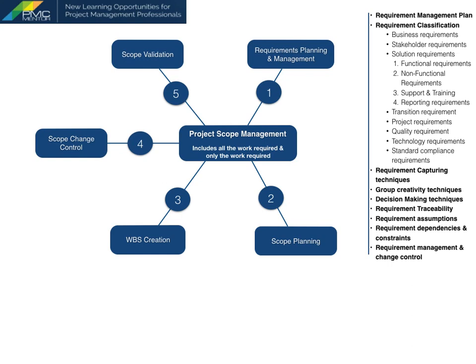These requirements should be captured from stakeholders using various techniques like brainstorming, interviews, focus groups, through the use of questionnaires and surveys as well as using benchmarking techniques. To allow creativity during requirement capturing activities, use of requirement management techniques such as context diagram, prototyping, affinity diagram and mind mapping are extremely helpful. Don't forget to finalize your requirements through voting or multi-criteria decision analysis.